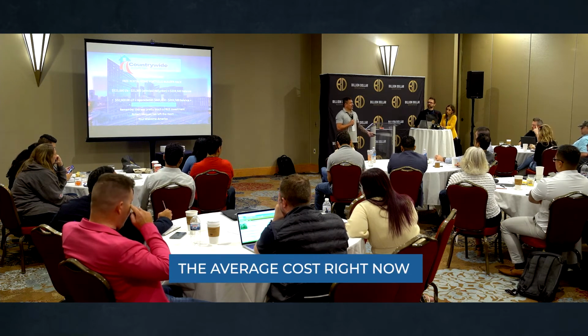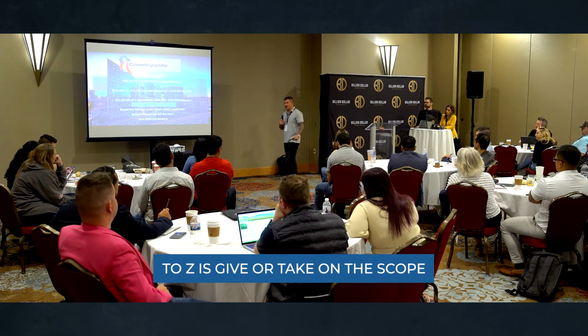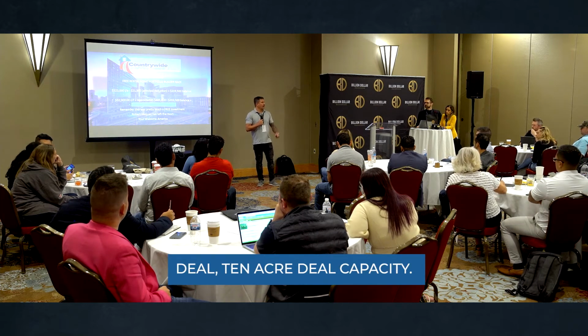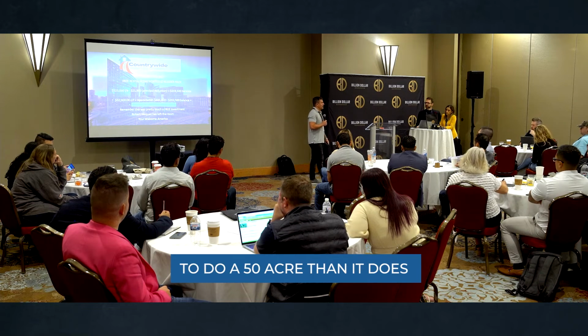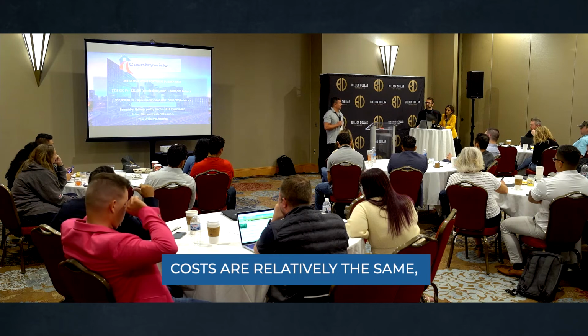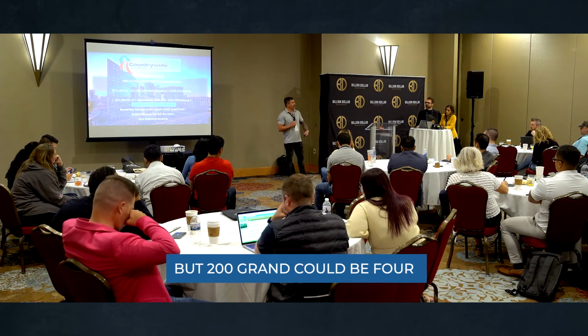The average cost right now for me to go through that process, if I take it from A to Z, is give or take, depending on the scope and the size. If it's a 5-acre or 10-acre deal, God bless you, I wouldn't touch it, because it costs me the same to do a 50-acre as a 100-acre property. Engineering costs are relatively the same, so it's going to be around 200 grand. But that 200 grand could become $4 or $5 million.